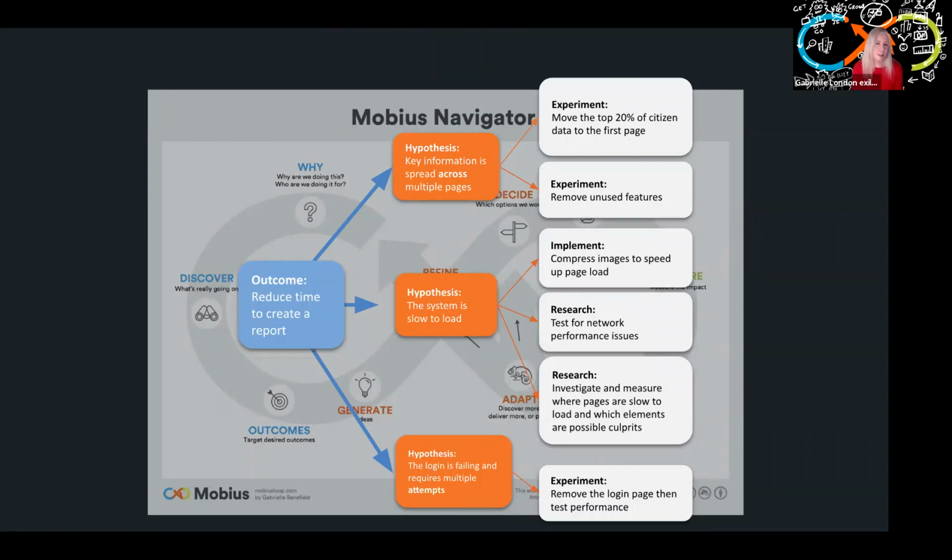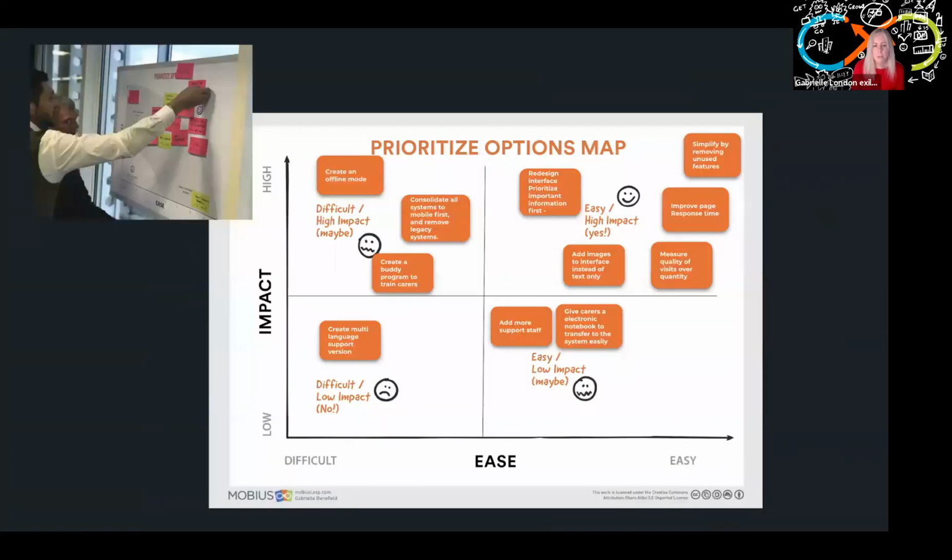We always say, what's the least amount we can do to achieve the outcomes? And the outcomes might be learning. What can we do to learn really rapidly? If it's something that we've already validated, or it's a no-brainer, there's no risk, no complexity we're adding, then we deliver it. So usually we're breaking things down to a lot of research, experiments and things we can deliver. Then we prioritize.